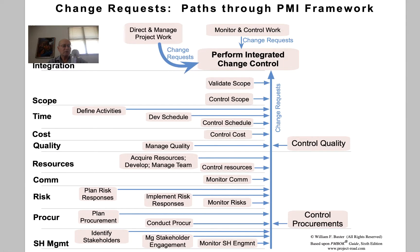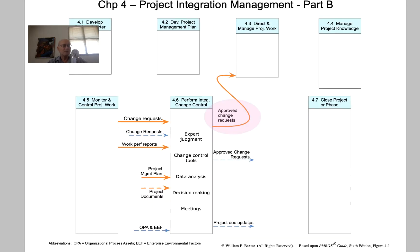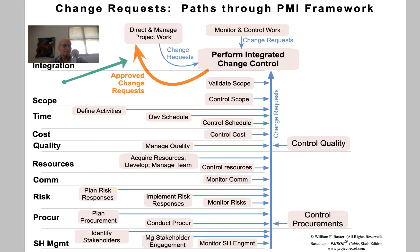We see change requests also coming from Direct and Manage Project Work in the execution process group. Approved change requests all need to go up to Direct and Manage Project Work — that's where we're doing all of the work of the project, so that's where we're going to implement these approved change requests. And that looks like this.